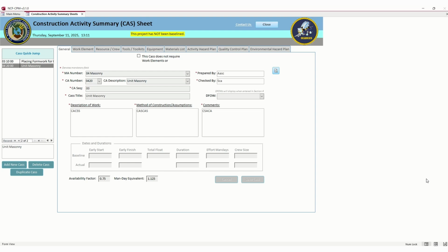You can use that. If it's a milestone, then you leave it at 0. And your milestone could be like, this is where we're going to turn over. That's where turnover starts. This is when we're going to start the project back up. Just milestones are things like that. If you are putting in here for informational purposes, you need to order concrete or order something else, you can create that by using this little mark here.